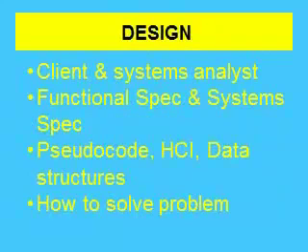In the design stage, the requirement specification feeds into and inspires the functional specification and the system specification. So the functional spec is what it does, the system spec is what hardware it needs to be able to run. And the client and the system analyst are usually involved at this stage, because the client has to OK things like the HCI design, and really has to be referred to each stage to make sure that the client is happy with what the team are doing.